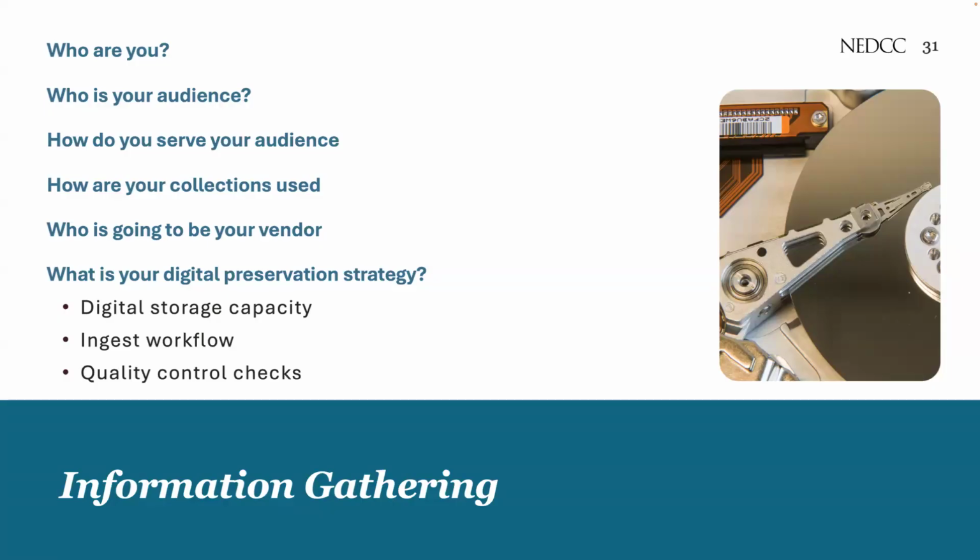So think about whether you can safely receive and store the digital files. Part of this workflow should include performing a quality review, a quality control check, on the vendor's work. And it might be helpful to establish the procedures for ingest and storage ahead of time, as well as how you'll check for quality. So definitely make sure you understand your vendor's proposed quality assurance strategy.